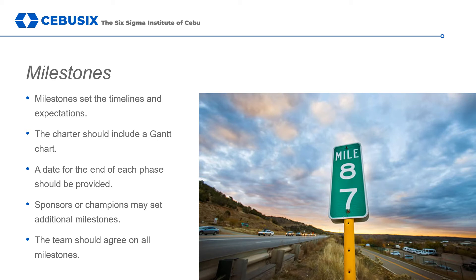If dates seem implausible, teams can present a counter-schedule with logical arguments regarding why the original schedule would not work. In addition to milestones at the end of each project phase, Six Sigma teams might also want to set milestones for work within each phase, specifically for the more laborious measure, analyze, and improve phases.